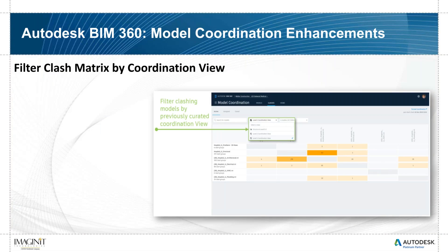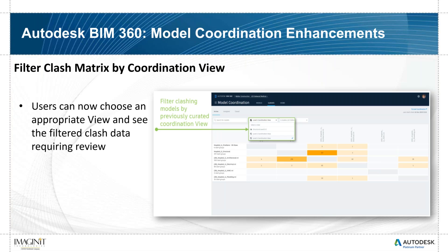The first enhancement is the ability to filter the clash matrix. This was already a useful tool — it showed a heat map where darker colors meant more clashes between different models. But it was still hard to find specific clashes; you'd have to run your eye down the left side to find the structural model, then across the bottom to find the MEP model. Now you can choose an appropriate view or pick specific models to see the heat map for.